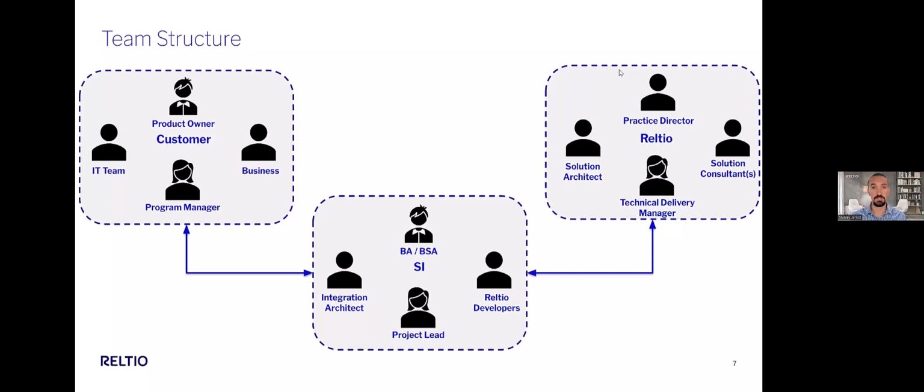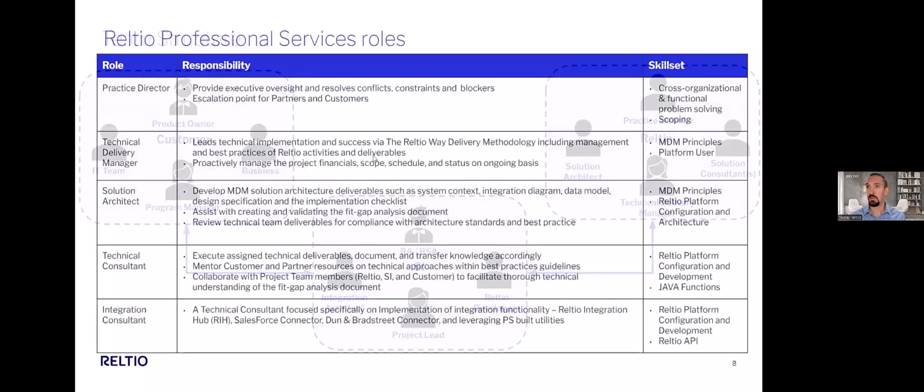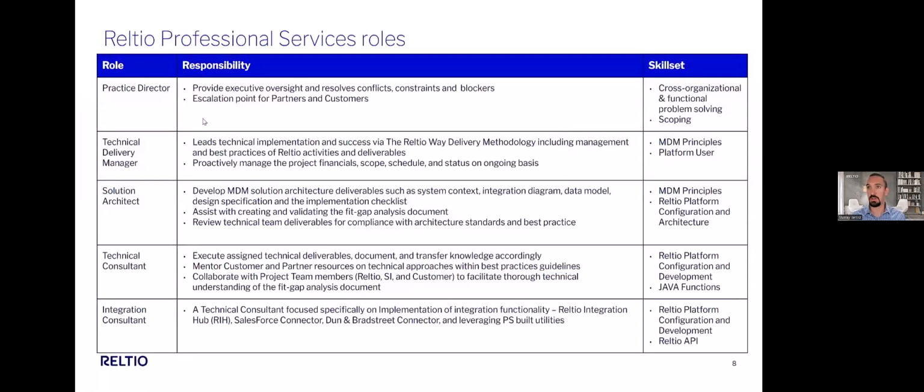And then of course, Reltio. So you would have a non-billable role, a practice lead like myself, an architect like Rakesh doing the design and getting those deliverables accomplished, a TDM, a technical delivery manager, ensuring all these progress to timeline and to scope, and then a solution consultant. They're one of the developer-type roles that does configuration. All right, last two here, and we'll do questions.